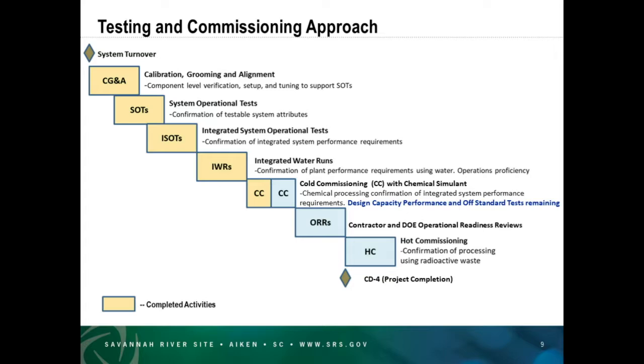In the performance testing phase, what we did is we ran, again, each of the systems at some nominal flow rate. So we were able to demonstrate, we ran 21 batches through CZIX, and we were able to demonstrate that they could produce to the design capacity. They ran between 6.9 and 7.3 million gallons for all 21 of them. So the system's very reliable.